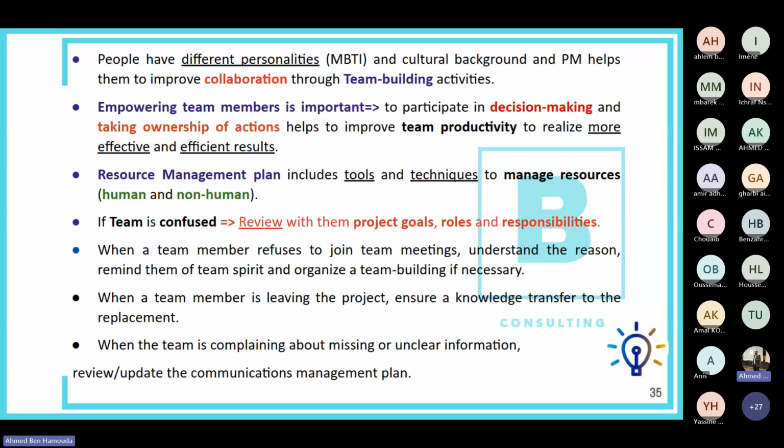Okay, so please remember these scenarios and remember that you need to pick really the best choice that fits with the PMI mindset. Okay. In case a team member is leaving the project, because for example they decided to join another project, or change the company, or simply quit, make sure that there will be a knowledge transfer from that quitting team member to the others. Okay, we need to ensure continuity of the knowledge among the project team members.